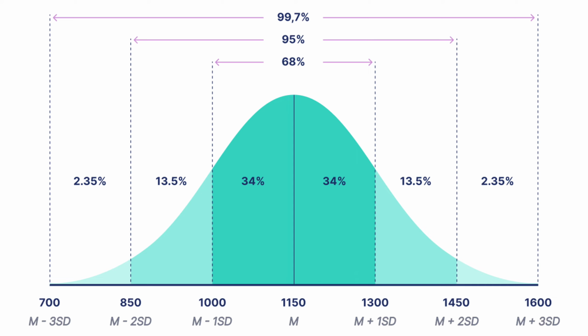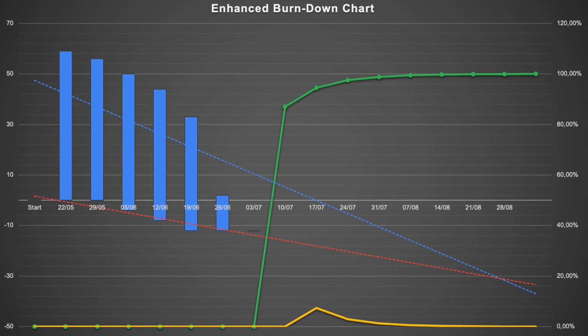This possibility is evaluated through the mathematical calculations of Gaussian and normal distribution algorithms based on a standard deviation of the task closure velocity. Without digging in depth, the green curve line represents the possibility of completing the project within the time frame. Ideally, if you need to define a preliminary end date of the project, you pick the date that sits in between 80 to 100% completion tolerance.